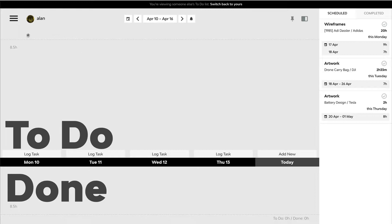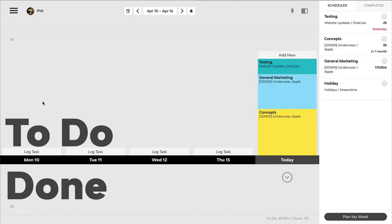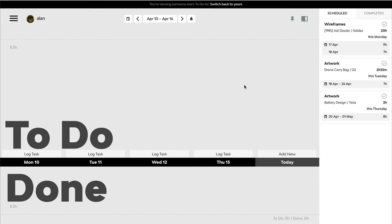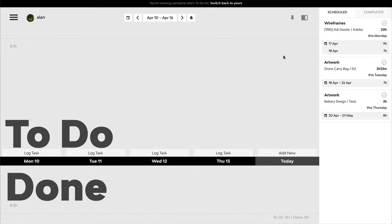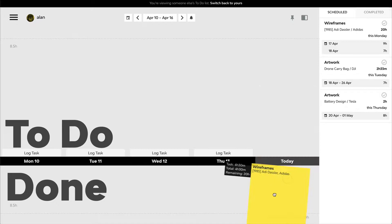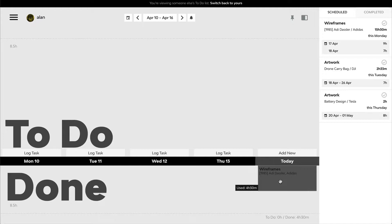Individuals can then plan their week. There is a button that they will have — because I'm viewing Alan's screen, I don't see it. But if I jump into Mo, who I'm logged in as, I can see it. That button says Plan Your Week. What that does is look at the work that's been scheduled and fit the to-dos across the week based on the priority order set. It also honors the schedule and whatever the scheduler has as the first order of priority. In Alan's case, if he were to auto-schedule this week, nothing would happen because nothing is due for today. Alan has a choice — he can pick up a task, drag it out, and assign what he plans to do for the day. Once completed, he drags and drops it down into the done pile, which tracks the time on that work.